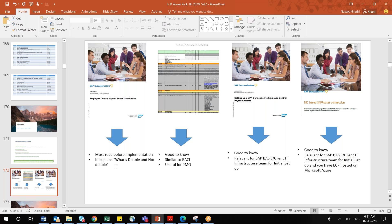For example, once you have acquired the EC payroll licenses, your client IT infrastructure team or SAP basis team must do the initial basic set of configuration. There are some VPN connections to be established, and connections between SAP and the client server. Those infrastructure-related activities are the responsibility of the client IT team as well as your SAP basis team from your implementation partner organization.